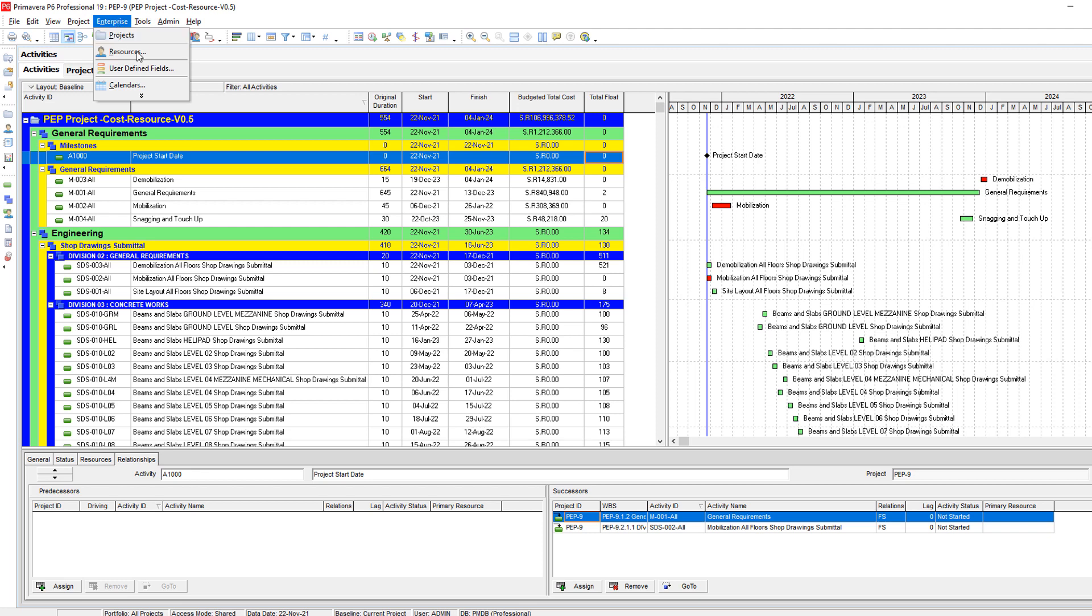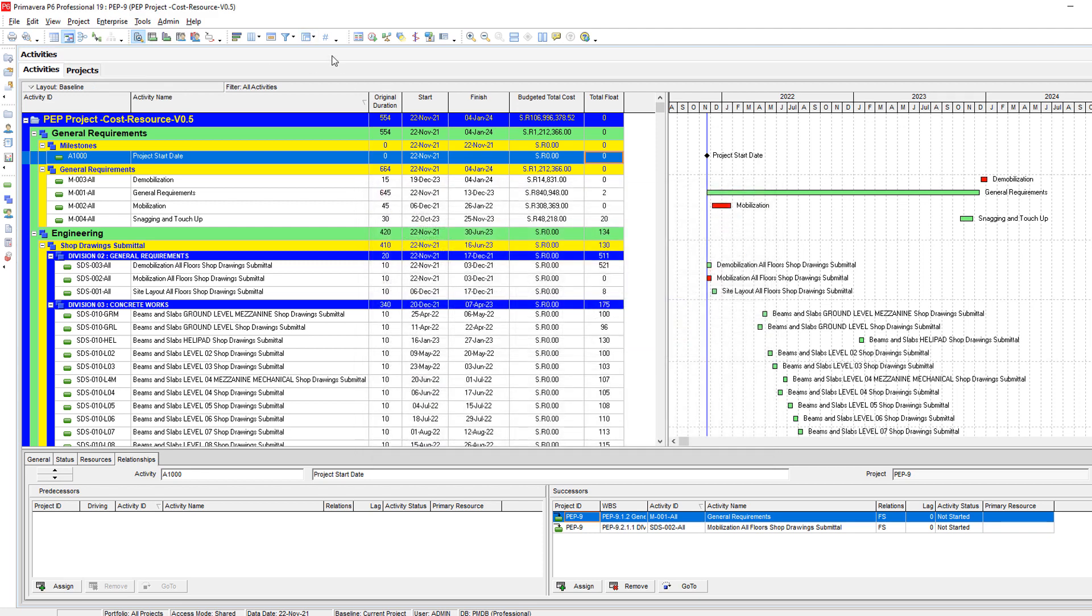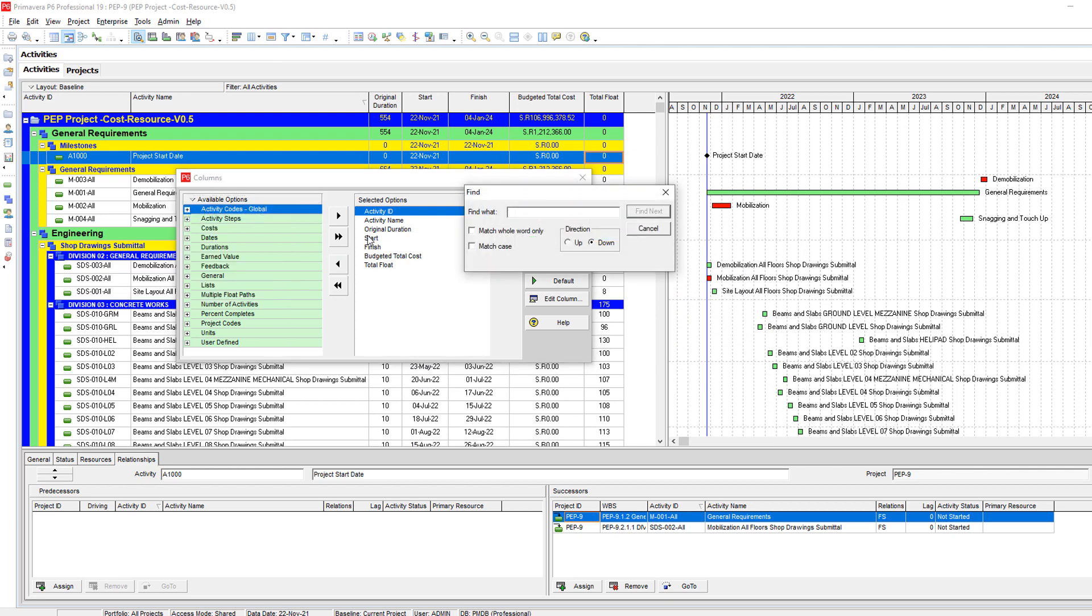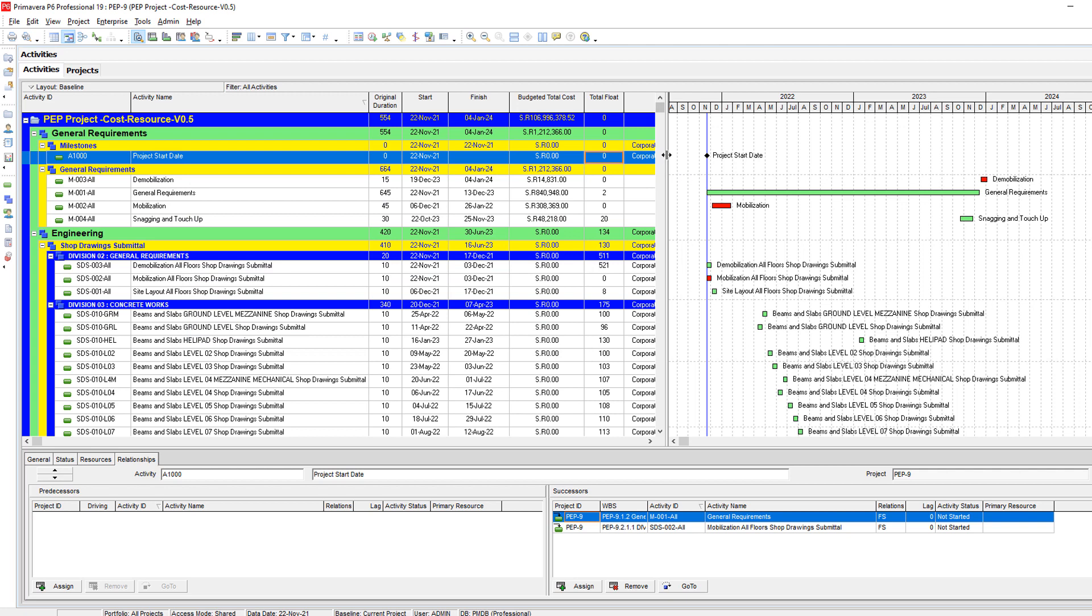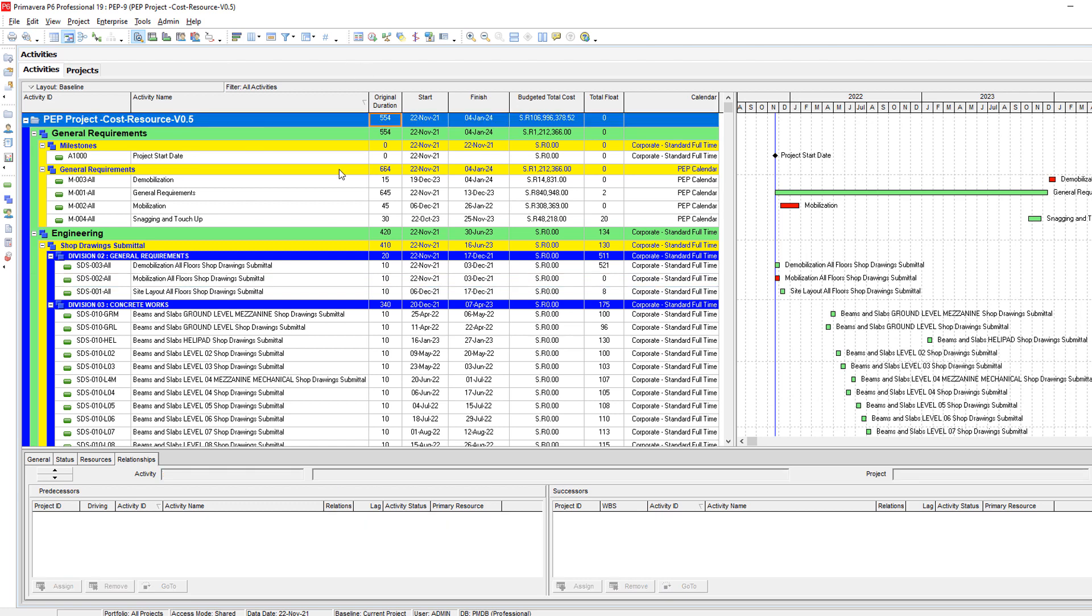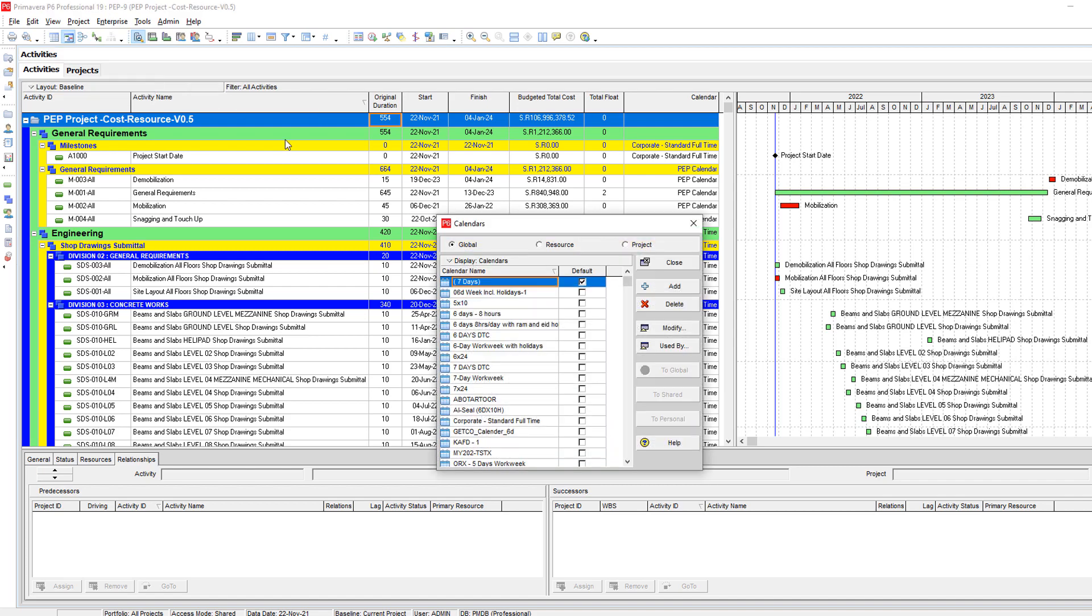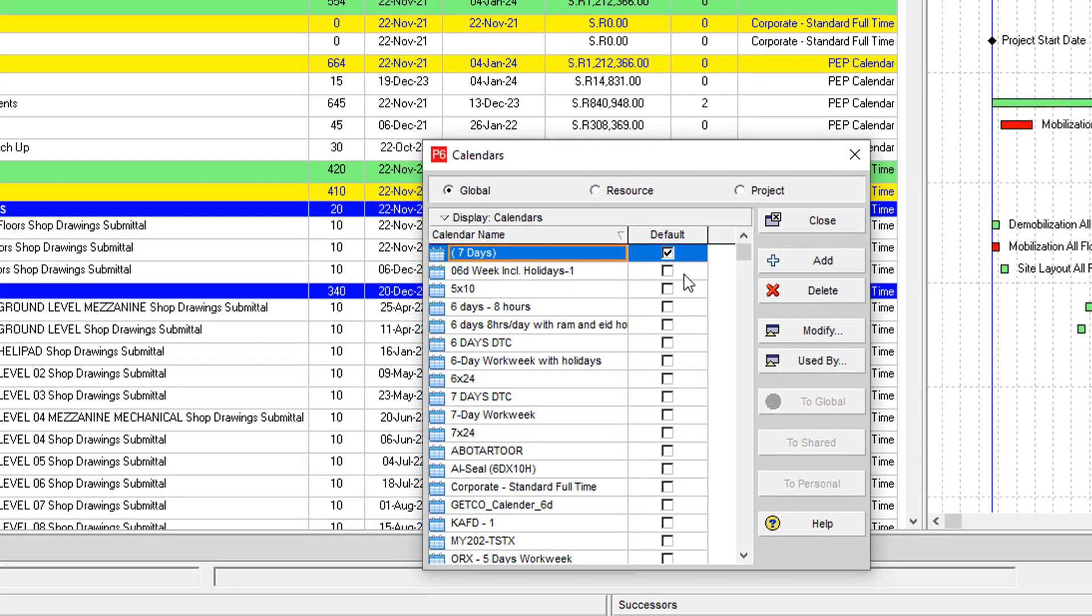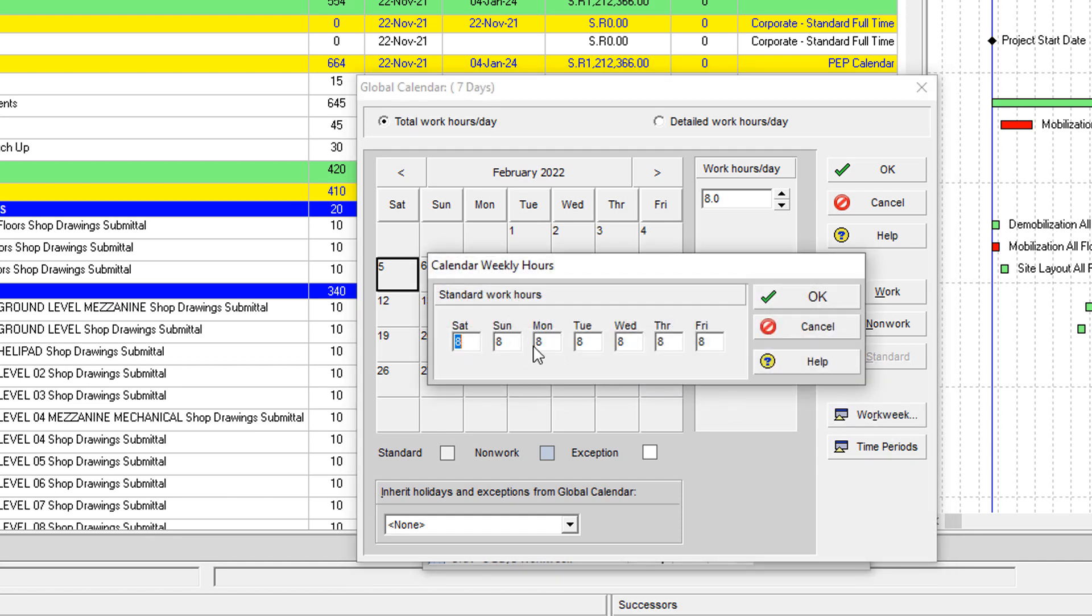So if we go here to the columns and show our calendars, what we need to do is to have here whatever calendar. But we need to show in the summary level of the project the working days. The first thing you need to do is to go to Enterprise and Calendars and be sure that your default calendar is seven days. And be sure also that the working weeks are all valid. No zero here, no zero here, and so ever.